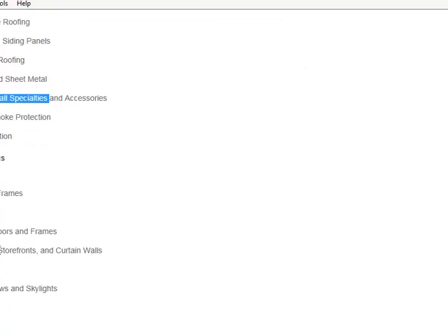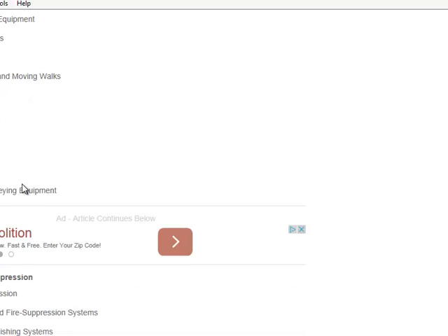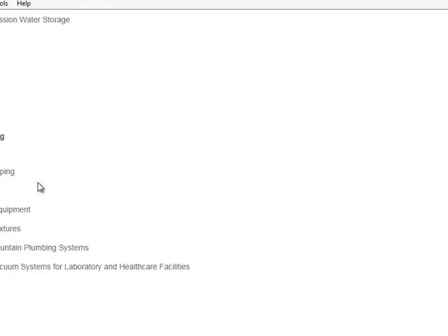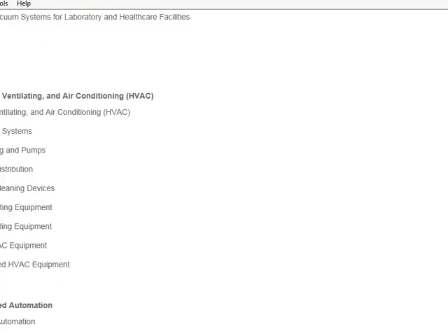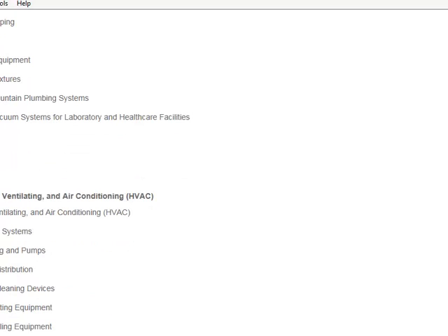What about the mechanical equipment, like ventilation and some of that stuff? That's 23. Why is it not the other one? Yeah, so I put it here. Division 11 equipment is basically all the other equipment except for the mechanical, plumbing, and electrical equipment.